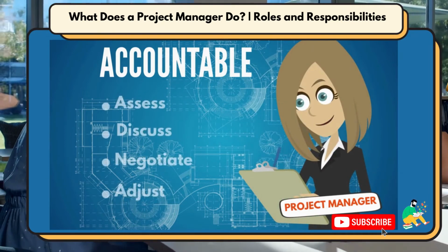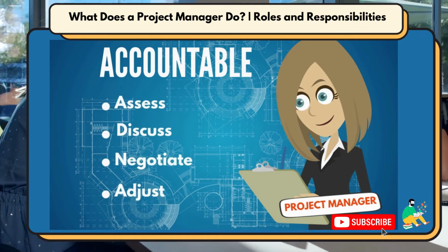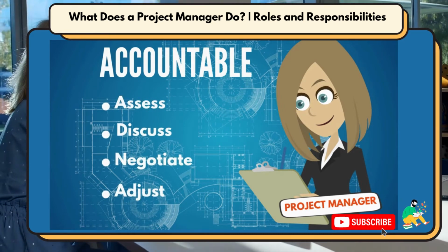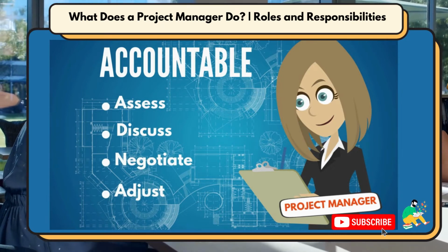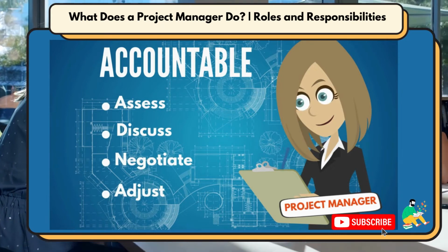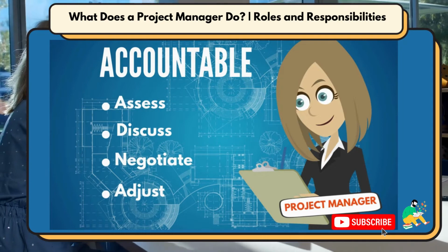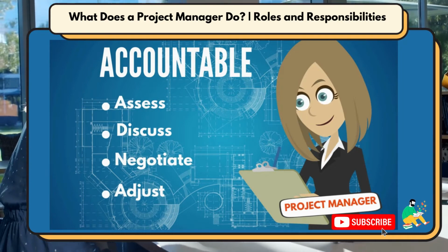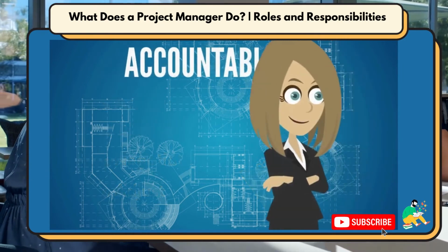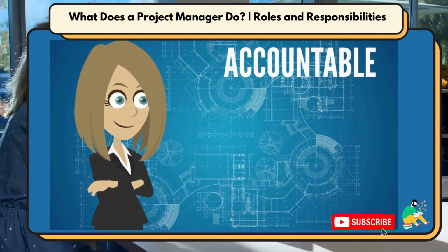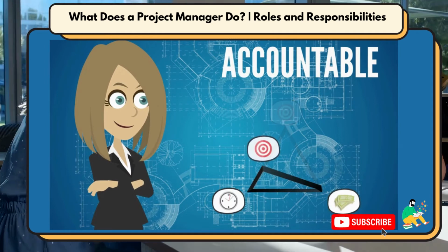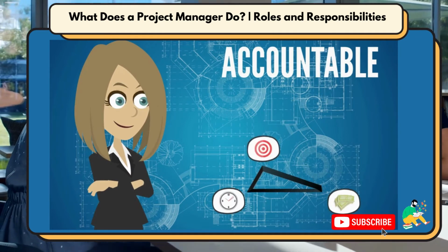It is the project manager's duty to assess a project and deem the constraints practical or otherwise, and if otherwise, they must demonstrate why to whoever proposed the project, and negotiate for additional time, resources, or an adjustment to the goal itself. Of course, a project manager is well within their rights to refuse to head a project if they feel the difference between the set constraints and the realistic expectations is too large.